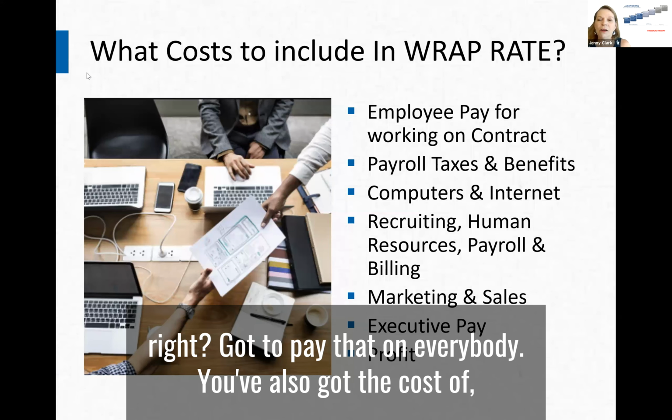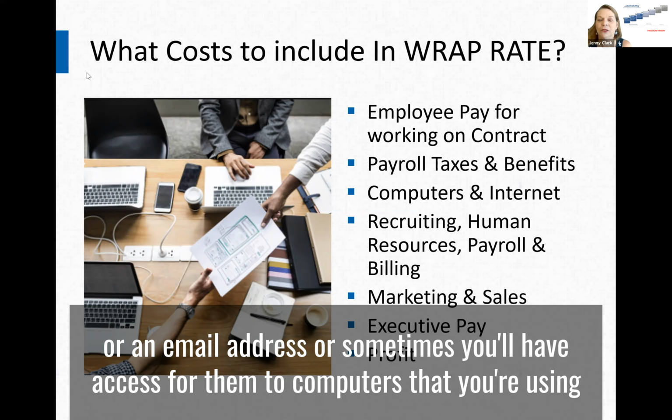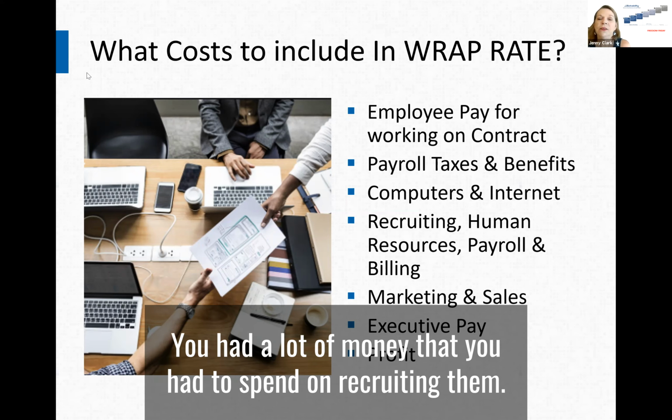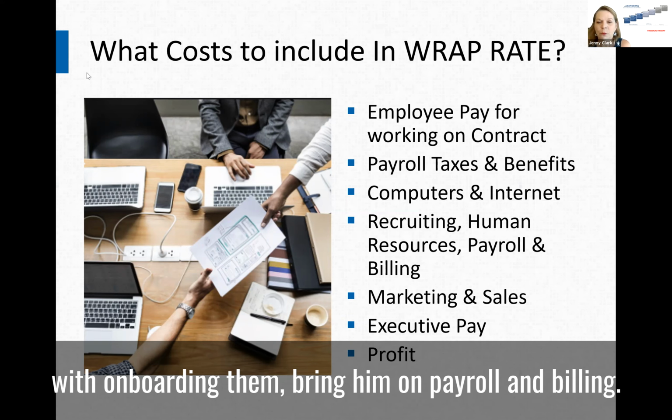You've also got the cost of if you have to provide them a laptop or a connection to the internet or an email address, or sometimes you'll have access for them to computers that you're using or your network. Sometimes they're inside your building and there's office space required. You had a lot of money that you had to spend on recruiting them. You might have human resources involved with onboarding them, bringing them on payroll and billing.